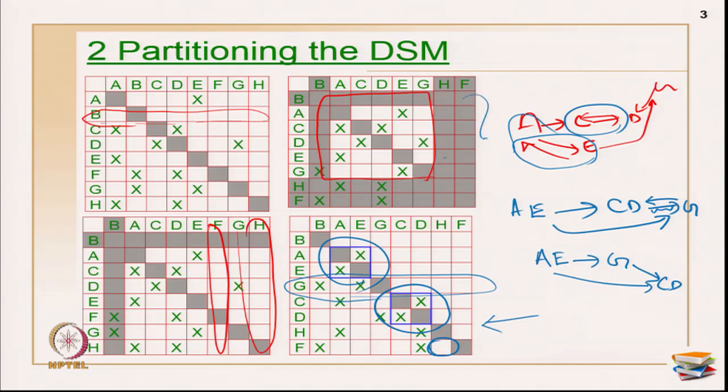I took the graphical view of this complete activity matrix and showed it up here. Then I merged all the activities which have a cycle length of 2, and did topological sorting again to understand the sequence. Then I replaced it in my partitioning DSM and showed the sequence for the whole project. Now, this is step number 2, or DSM operation number 2.